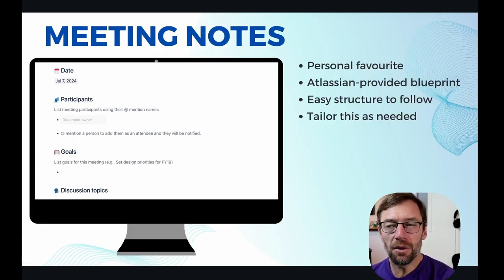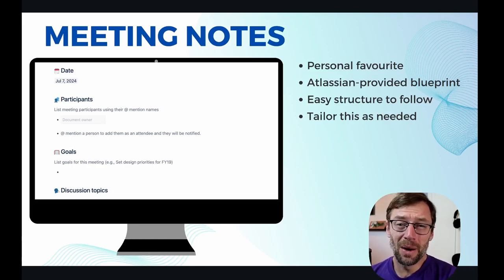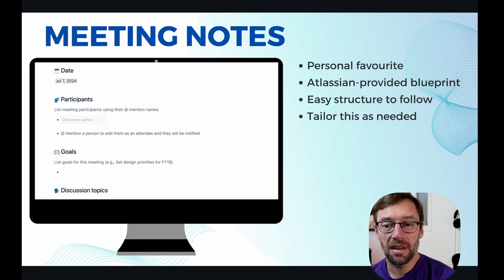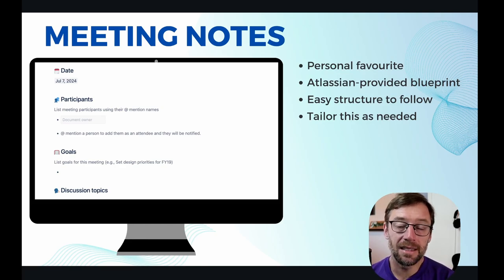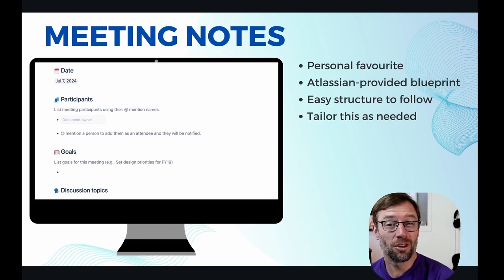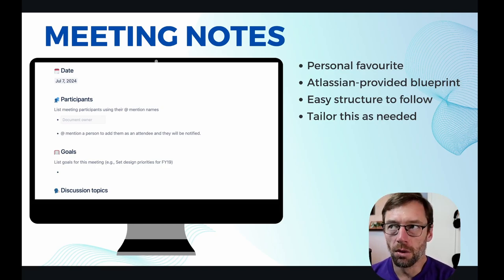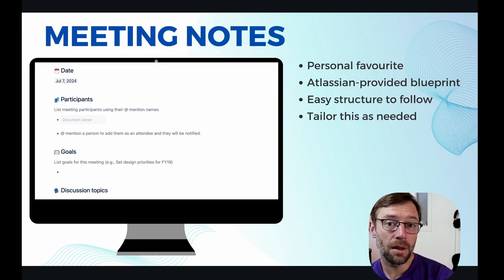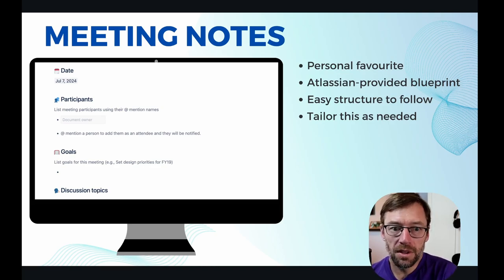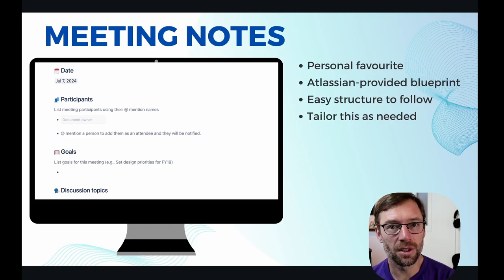I use Confluence quite a bit for meeting notes. I have hundreds of these, and this is a built-in template called a blueprint that Atlassian gives us. It's one of my favorite things in Confluence. It gives me a great structure — it lets me record who was there, what the goal of the meeting was, what happened, and at the bottom it includes spaces for action items and decisions. I'll encourage you to tailor this template or design your own that best fits your needs.